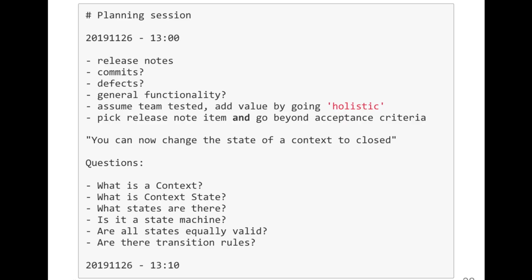So I've made a decision. In 10 minutes, I've focused it in. I've rejected certain approaches for doing it. So I know what I'm not covering. The planning session is also about identifying what you're not going to do, and what the potential risks of not doing that are. And I track it, I write it down because it's useful to revisit and go, oh yeah, we kind of thought about that, but discounted it for these reasons. So that's the result of my planning session.